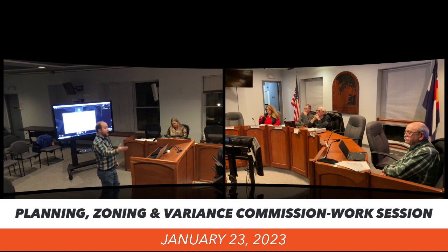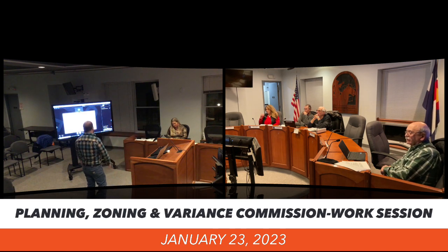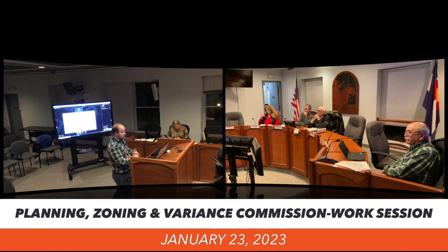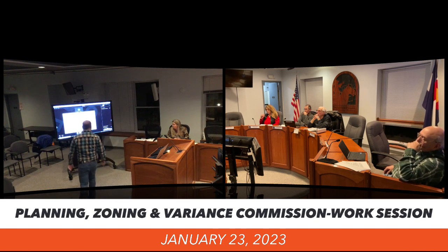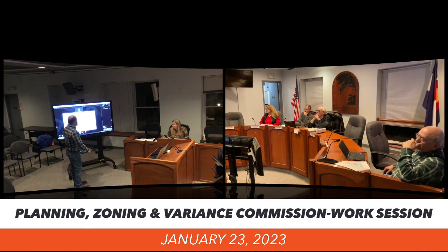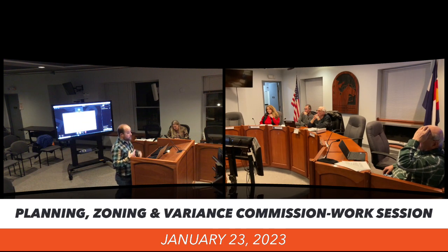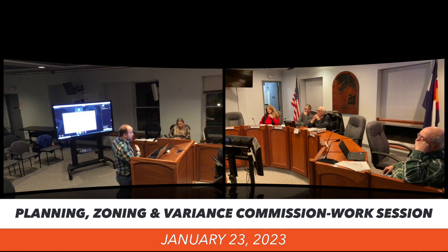The council and the planning commission, though, were able to look at that and say, that'll work for us. This will fit in the neighborhood. We understand what you're doing. And then at that meeting, they say, here are our concerns. During this meeting, they said, this is a big multifamily development. They said, Michael, it would be really nice if we could build a little neighborhood playground for all the kids that are going to live in this new subdivision. So we dedicated a half-acre park. Those were the kind of decisions that came out, and so I knew right up front that they wanted a little park, and I created it.